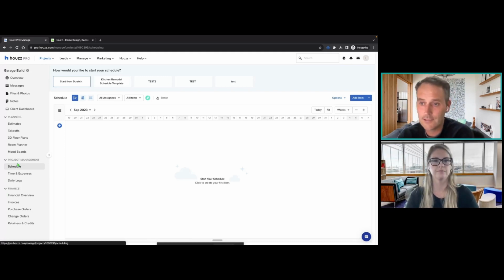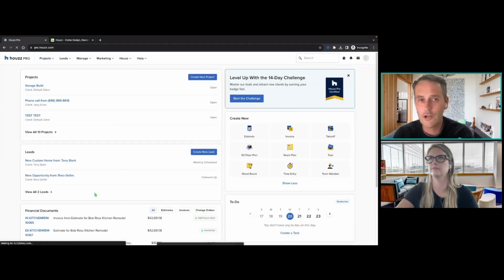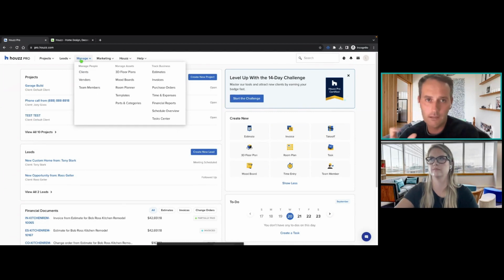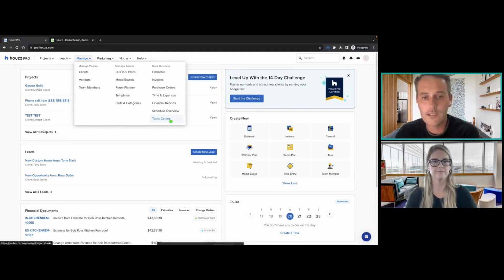And then David has asked, can you have tasks that give notifications on when it's upcoming or due or overdue? So absolutely, you can add tasks to any item on the schedule. Some of the great use cases we've seen are people who, say, have the concreter coming on X date, will set a task as a reminder to ring the concrete contractor to make sure he is definitely coming, and then they need to order concrete, so they can set tasks for like 2 weeks before the item is actually due. So yeah, some great questions there.